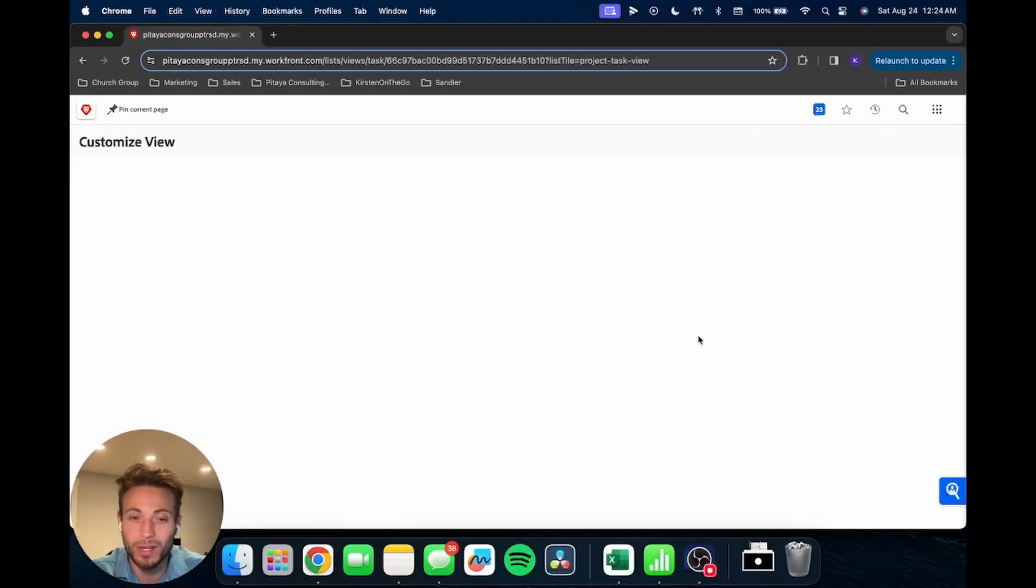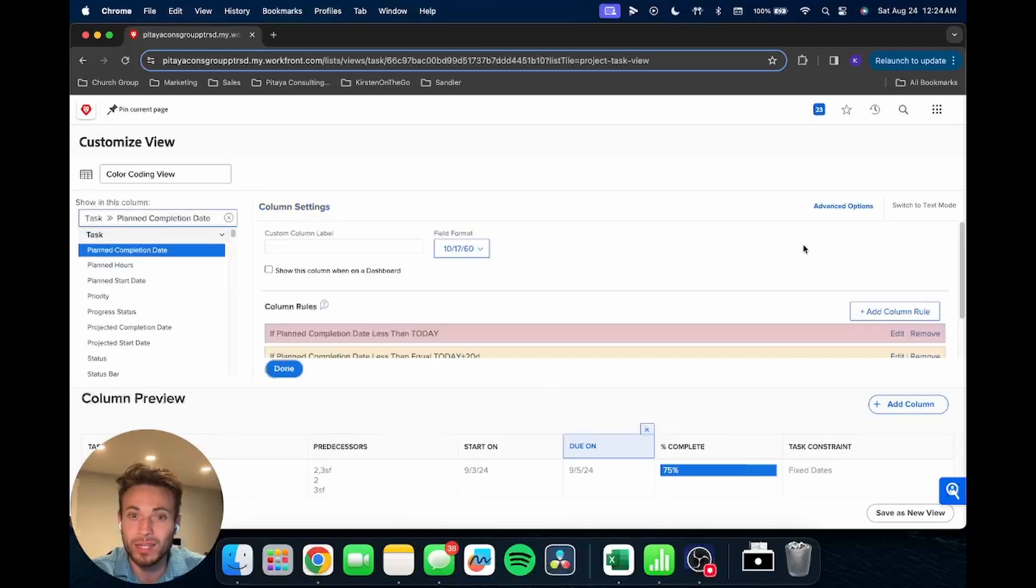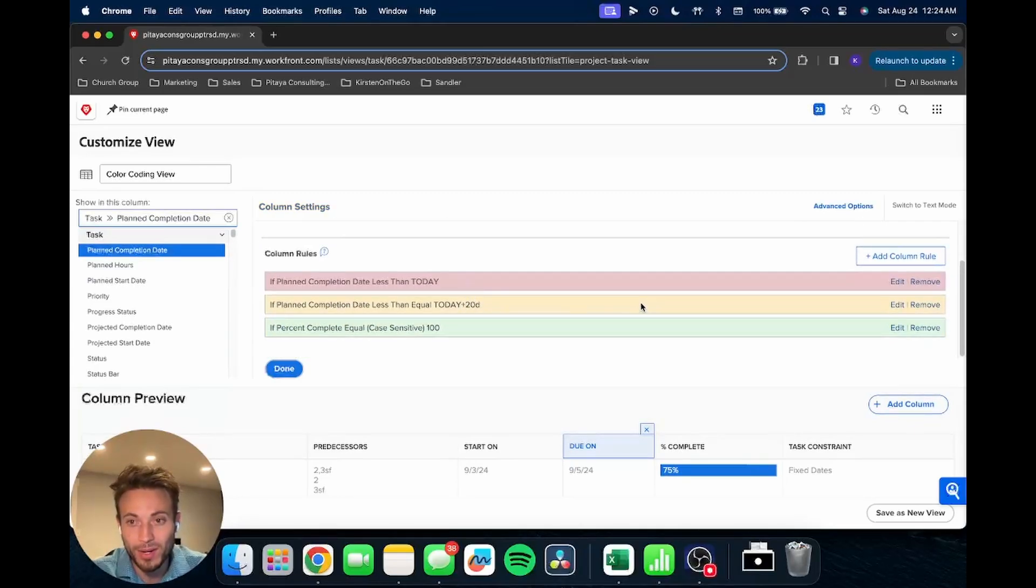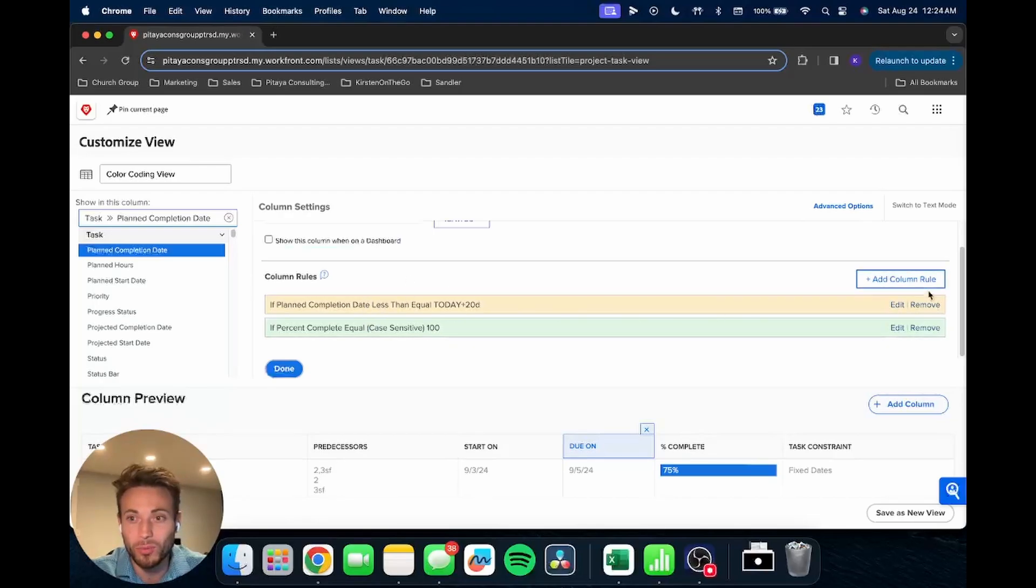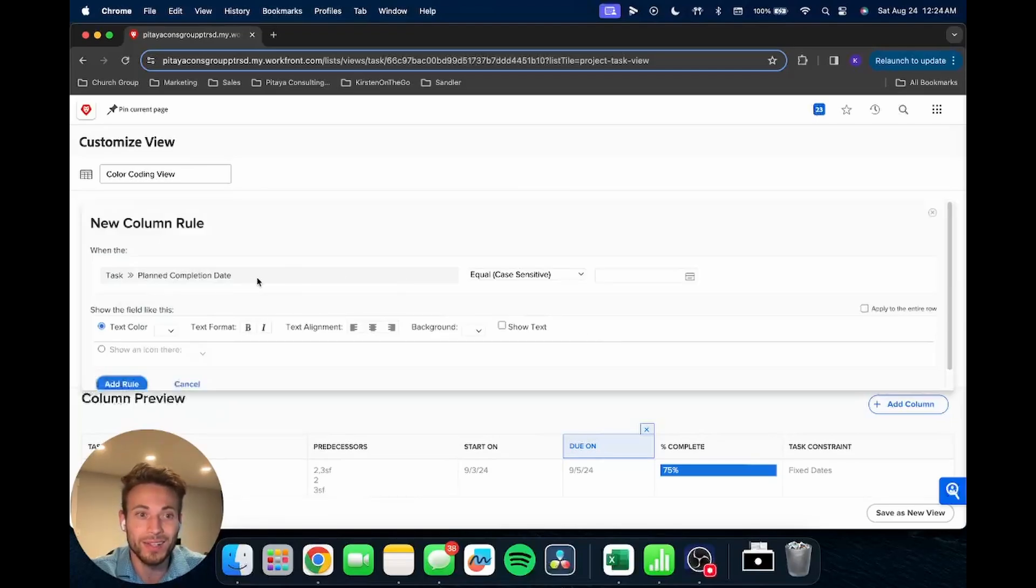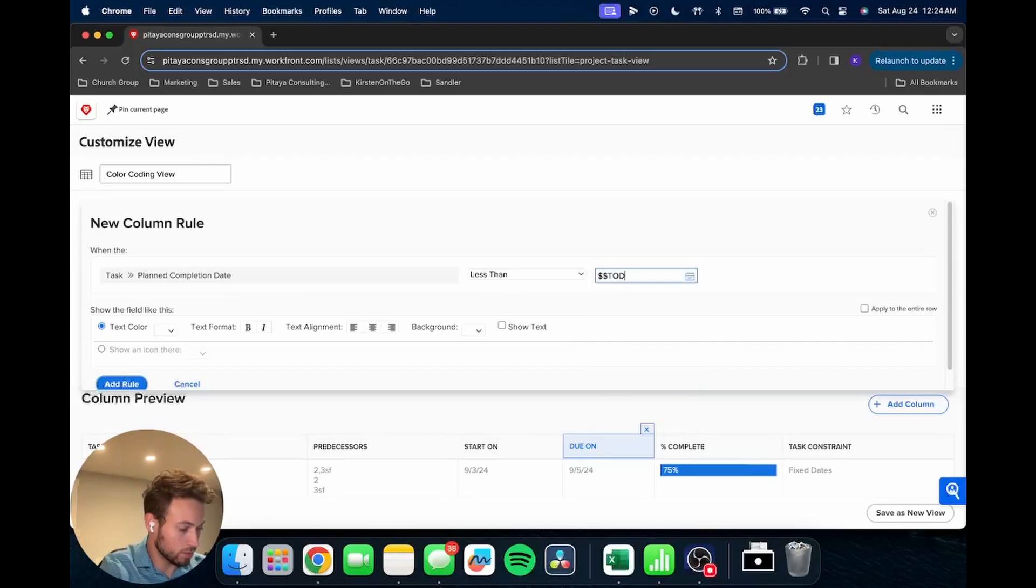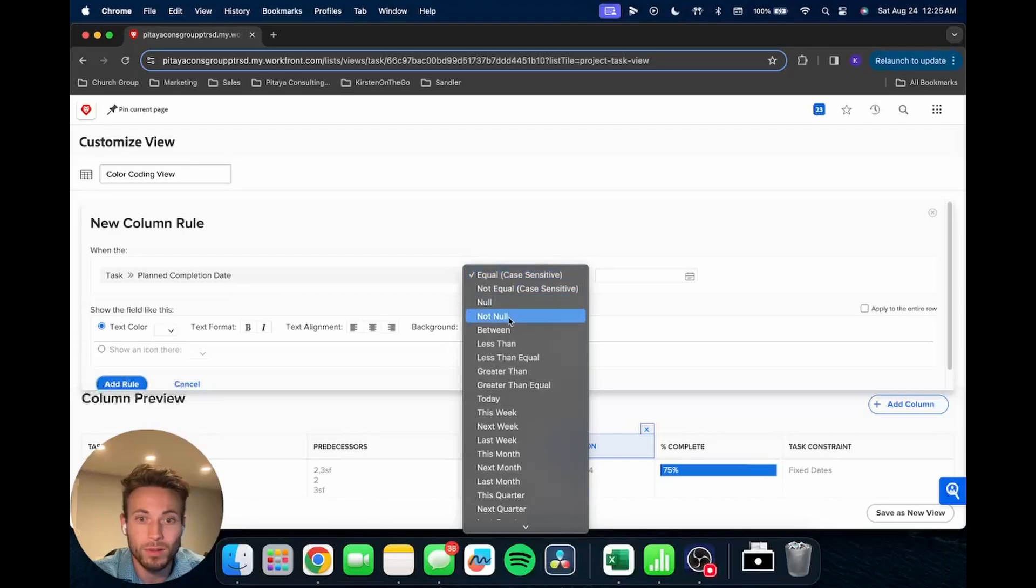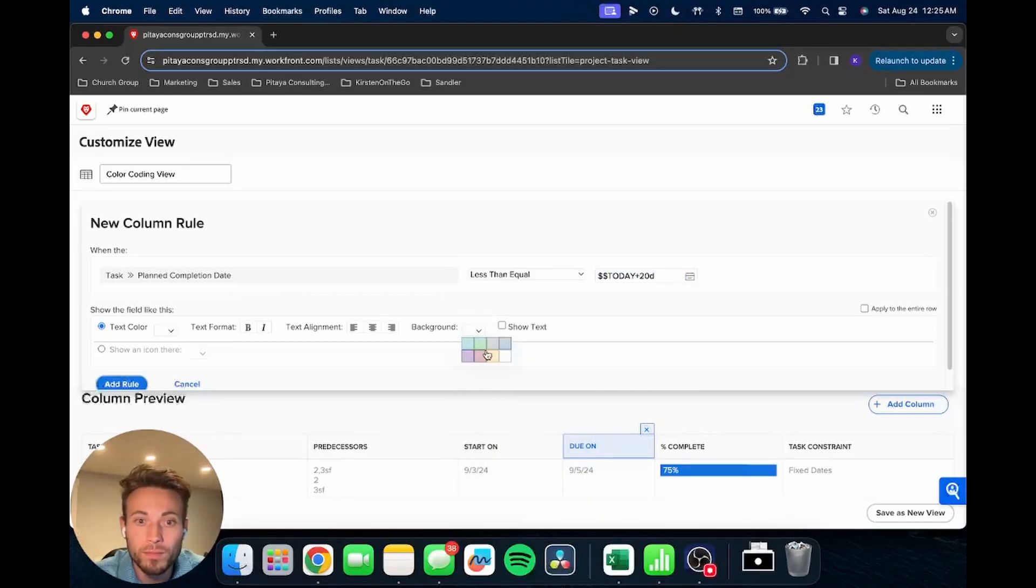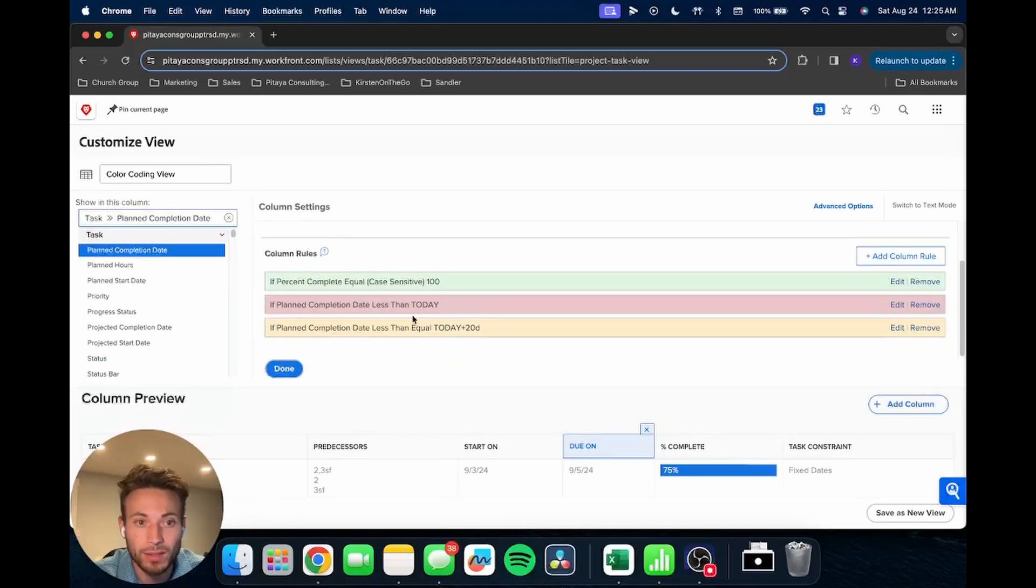So let me show you how to fix this. So we're going to go in, and the important thing to know is that these rules actually have a hierarchy. Okay, so in order to get this to work properly, what we're going to need to do is remove both these rules so that this one is now the first rule, and we're just going to add those other ones back in. So I'll just add those in real quick, add the other one for due within the next month. Okay, so now we have all those rules.